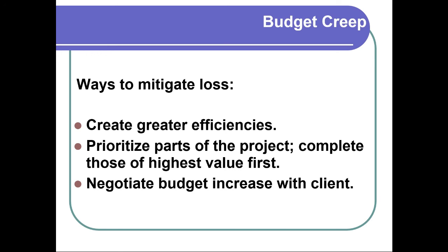And if there is a problem, most clients are reasonable. Hey, this took a lot longer. I've been working with the client now, and we've had our design sessions, and they took way longer than we had anticipated. And we went back to them and said, hey, we're out of hours for this project. And we haven't developed anything yet because the design process has been great. We've discovered some awesome things, but wow, it took us a lot longer than we thought. We're going to need some more budget, right? Sometimes you can get away with that. Sometimes the client is like, no, why didn't you warn me ahead of time?